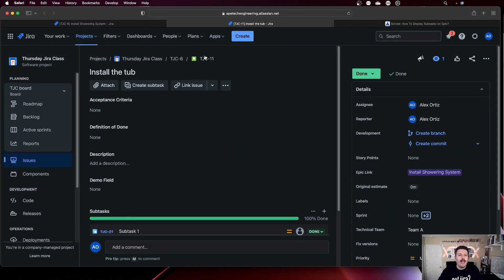If you take a story — and you can do this with a story or with an existing subtask, but I'm going to do the story because I think this routes a lot easier — so if you take a story like this one, TJC-11, "Install the Tub," this is currently a story. That means the story will show up in your backlog when you're planning your sprints. This is intended behavior. Only your stories, tasks, and bugs will show up in your backlog. But if you, for whatever reason — and again I don't know why you would want to do this, it seems silly to me, but what do I know? I've only been using Jira for six years and been a scrum master for twelve. So I would personally not recommend what I'm about to do. Legal disclaimer: do not do this unless you accept the unintended consequences. Proceed at your own peril, because I don't know what kind of consequences this is going to have. All I can tell you is this is the technical way of adding a subtask to an epic.